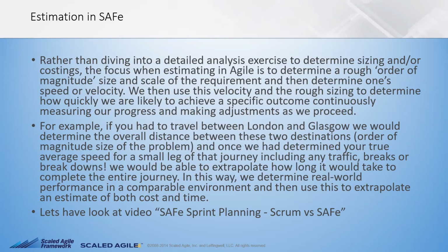And once we have determined your true average speed for a small leg of that journey, including the traffic breaks or breakdowns, we would be able to extrapolate. This is what we normally call trend analysis: how long it would take to complete the entire journey. This way, we determine the real world performance in a comparable environment and then use it to extrapolate an estimate of both cost and time. So after we learn these things, we can really achieve the efficiency of progression.